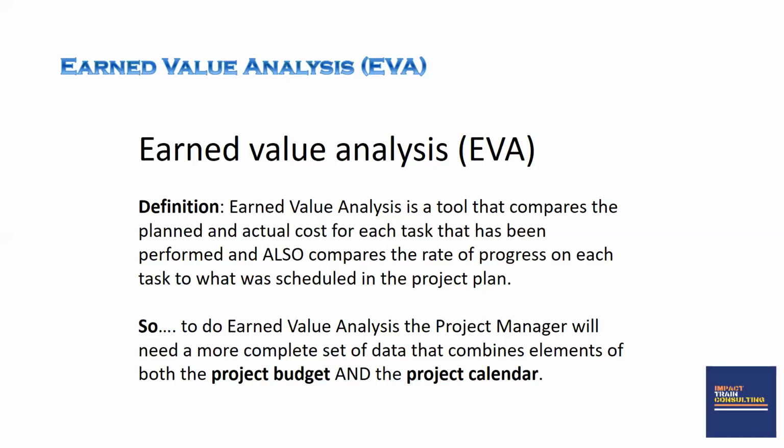But if they did an end value analysis, because the end value analysis will require that they compare the rate of progress of the activities in your detailed implementation plan to what you have on your budget. And so they may see that based on the amount of activities that you've already done in your detailed implementation plan, you are actually not overspending or underspending.